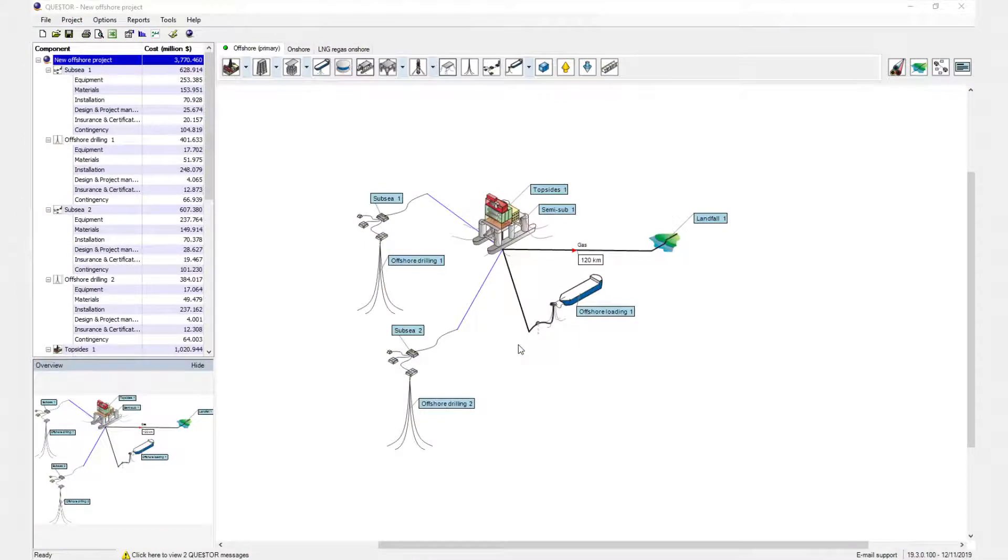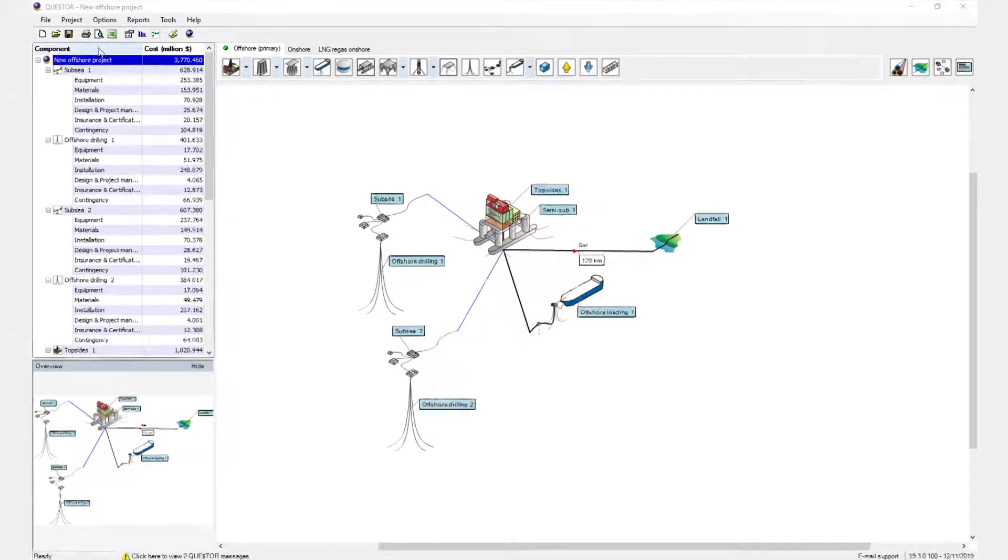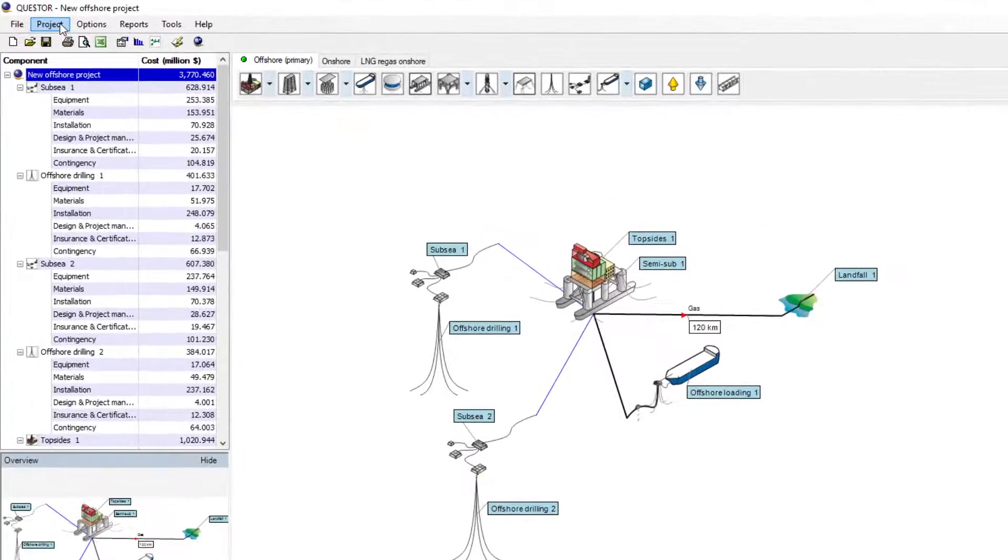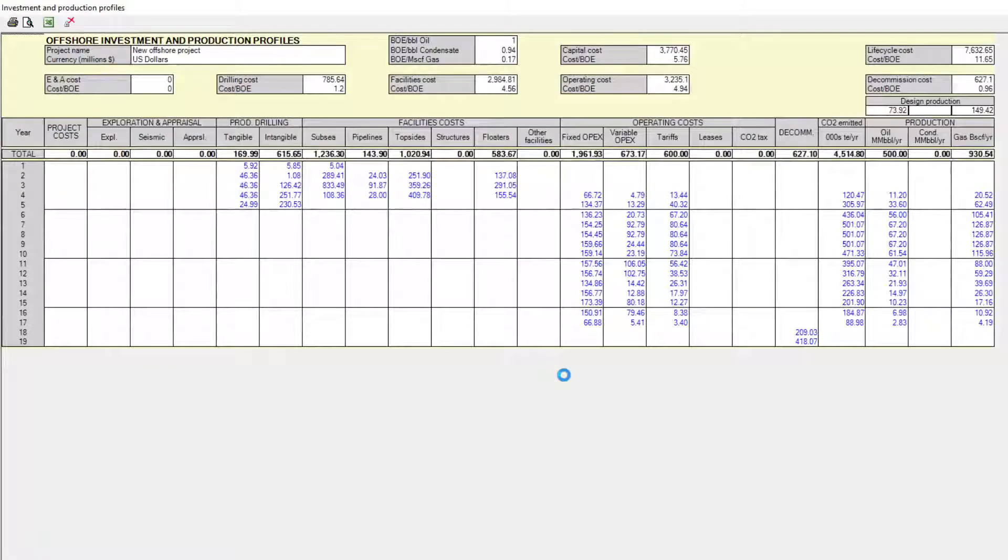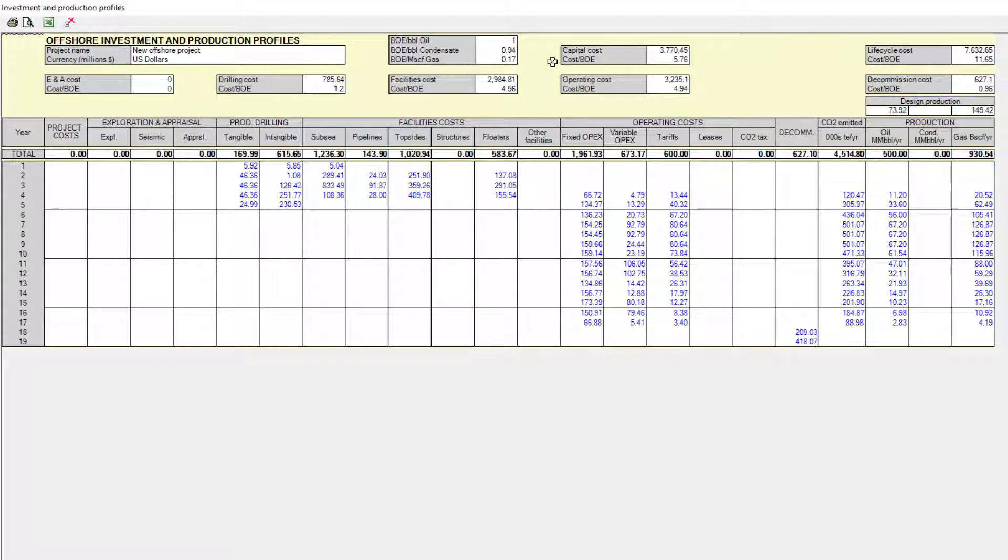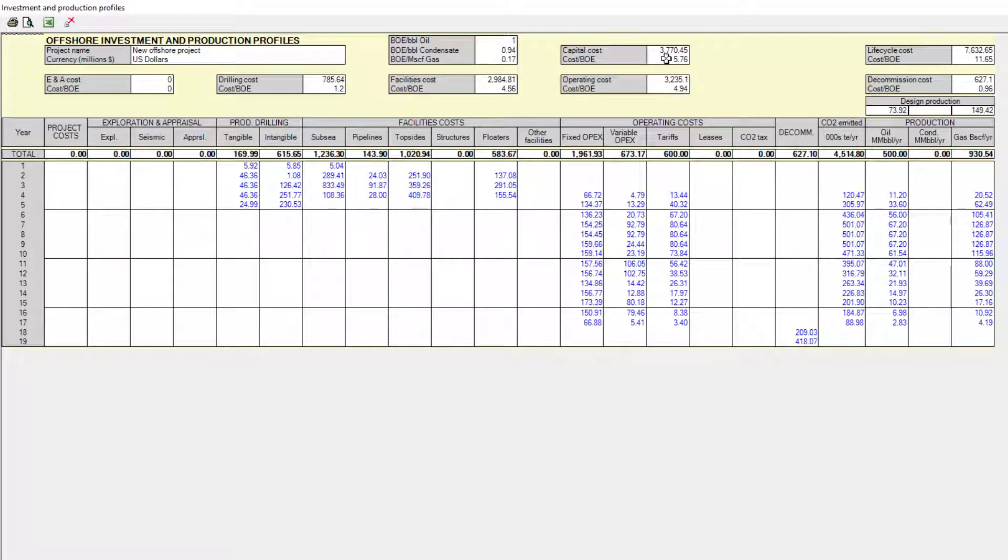The investment and production profiles report will provide an overview of the project's CAPEX, OPEX, the commissioning expenditure, and annual production profiles. The CAPEX per barrel of oil equivalent is one of the project metrics shown in this report.